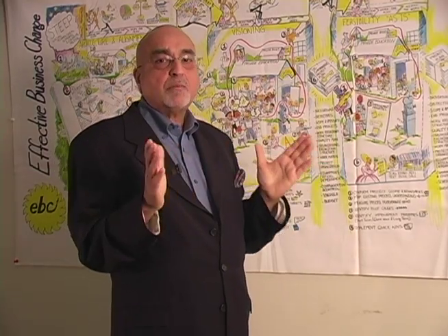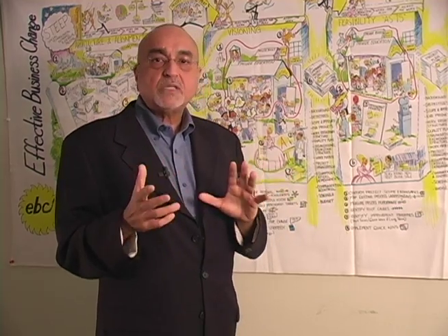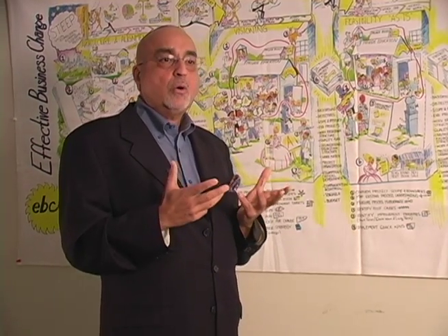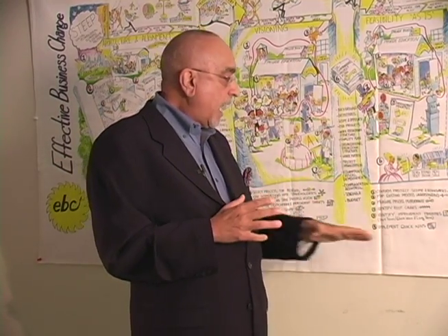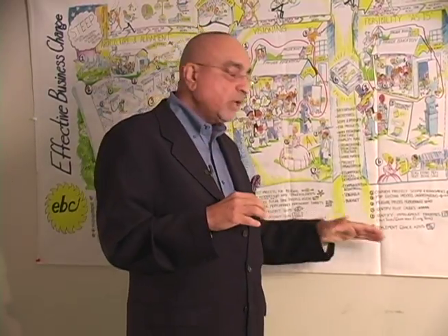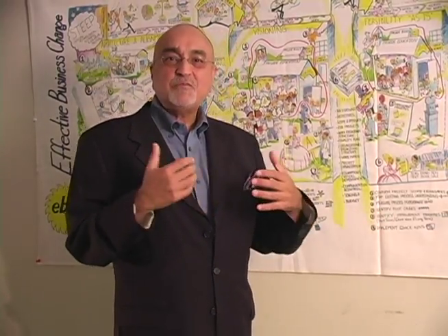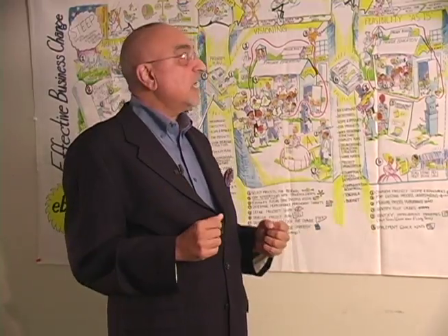Typically, these quick wins might be anywhere from something that can be done within 1 month to 2 months or 3 months, and also may not cost much money, perhaps no more than $5,000, $10,000, or whatever the team decides. And also, by the way, sometimes the understanding is there that these quick wins are a throwaway. Because when we do the to-be design, it's likely that these are just short-term solutions and will be thrown away. And that's an okay understanding.